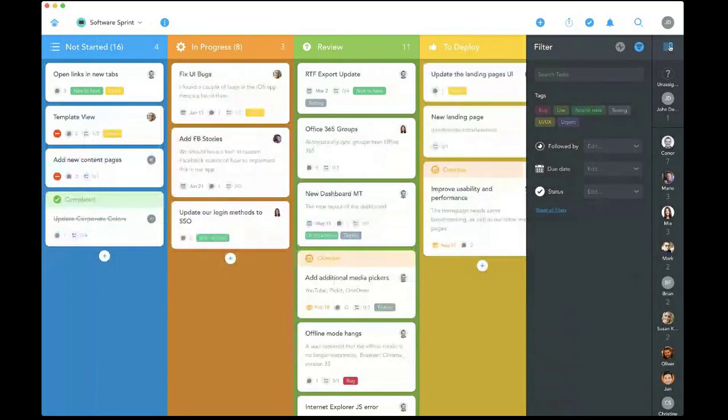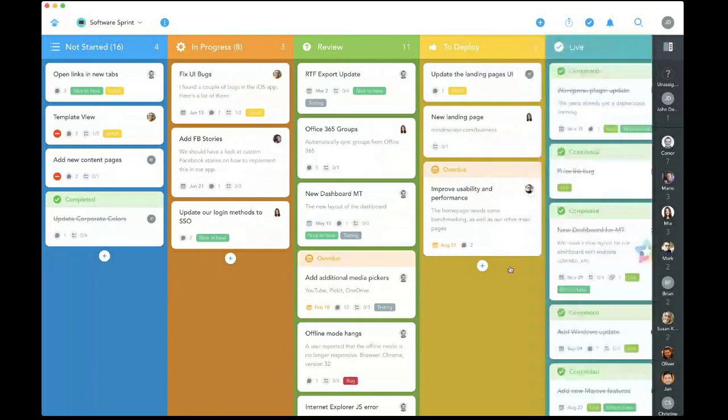So these tags are a pretty cool way of using and adding an additional layer to Meistertask, because something that you might struggle with in the beginning when using the Kanban principle for the very first time is that you're not using the columns anymore for the different categories like you probably did before in an Excel or in another non-project Kanban tool here. Now, using these tags as categories can really help you, because this way you can see where these tasks are at and still see the category at the same time, or even filter for the category here.